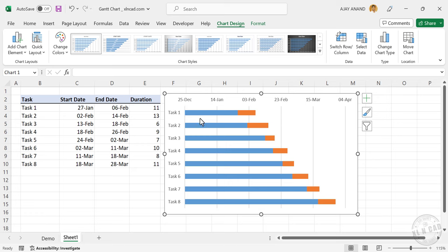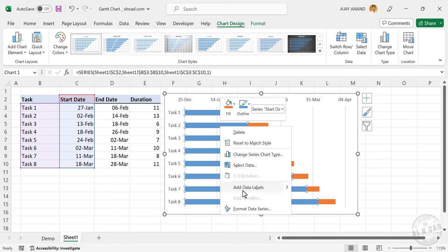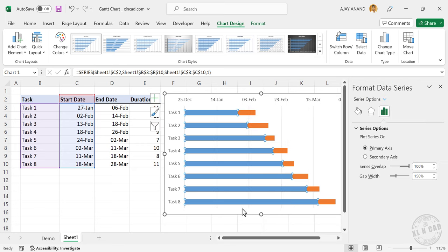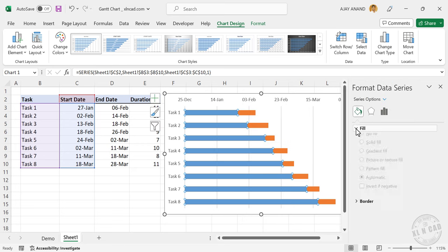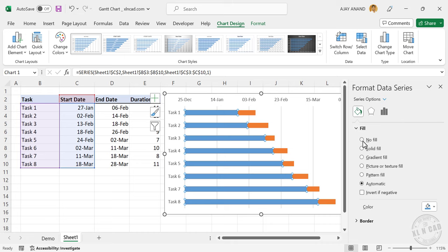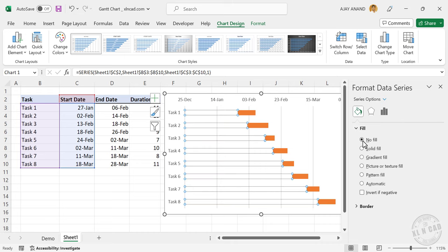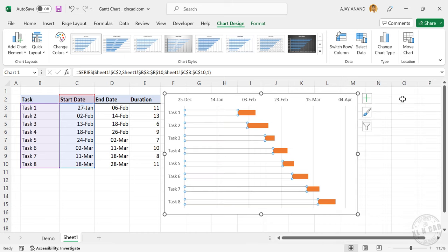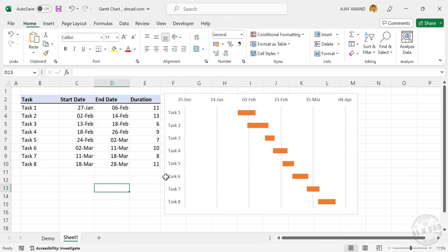Now to hide these blue bars, right click on any of these bars, format data series, fill line, fill, no fill. See the blue bars are gone.